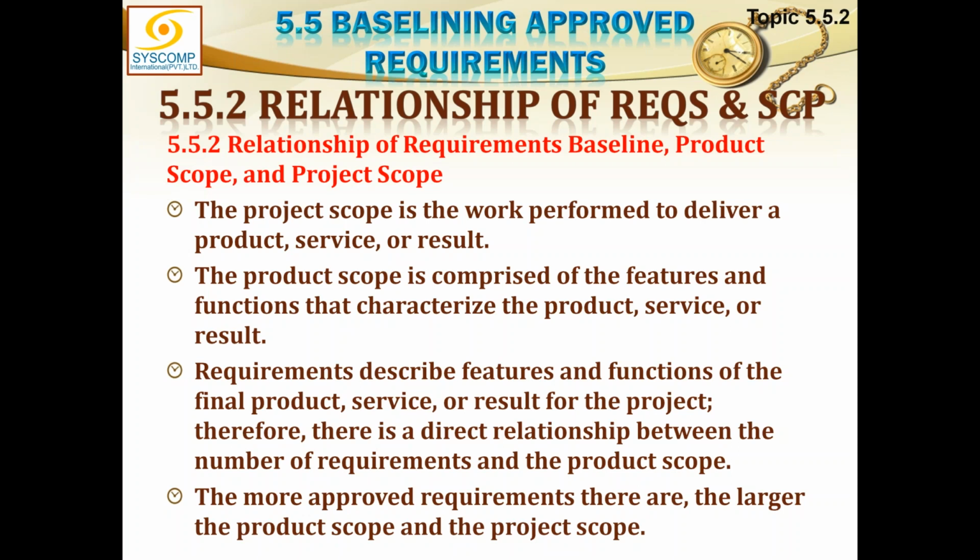Therefore, there is a direct relationship between the number of requirements and the product scope. So all the requirements are encapsulated into the product scope, describing what is to be created, and project scope defines how it is to be created. The more approved requirements there are, the larger the product scope and the project scope.